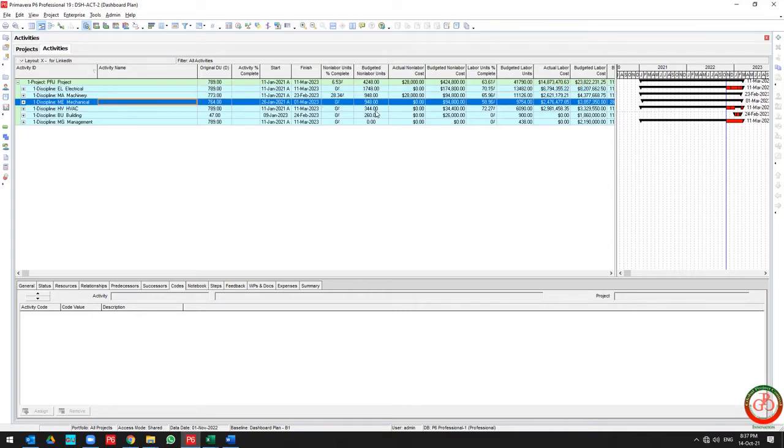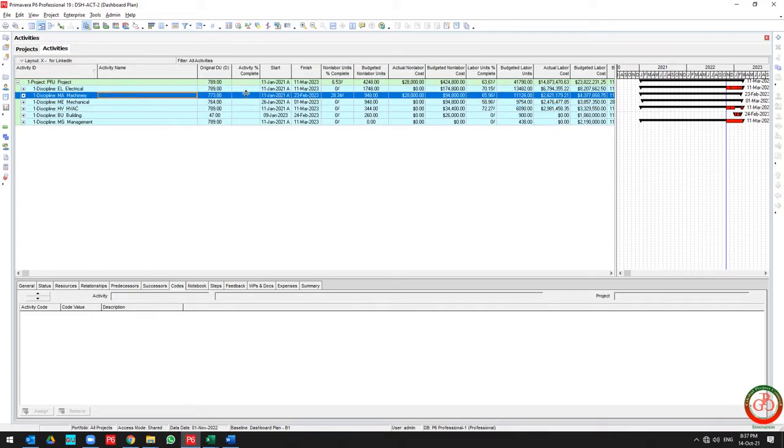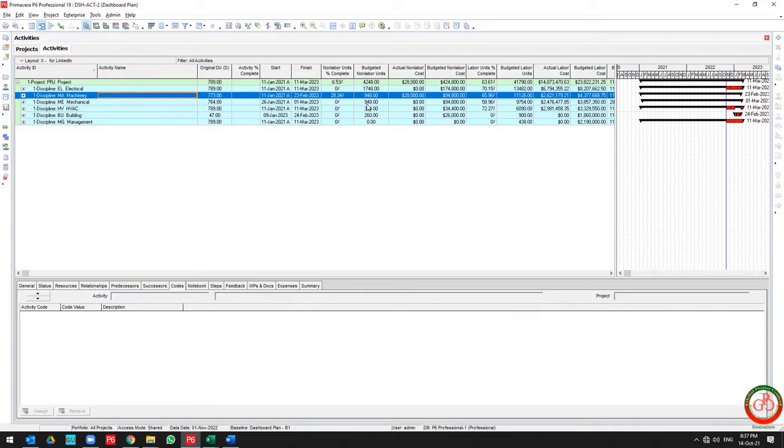I have the overall progress for each discipline in my project. This is my machinery progress for non-labor units, this is my machinery progress for labor units.